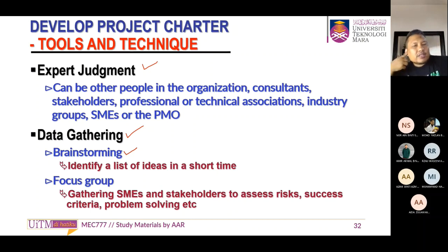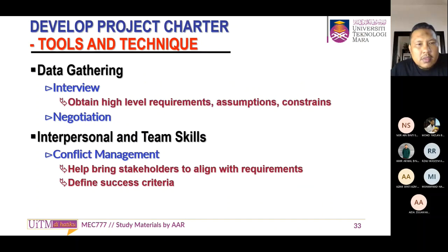The second one is the focus group. Through data gathering, we have a focus group, gathering the SMEs and the stakeholders to assess the risk, success criteria, problem solving, and etc. In data gathering we also have an interview. In the interview, we obtain the high level requirements, assumptions, constraints, and then we also have the negotiation.